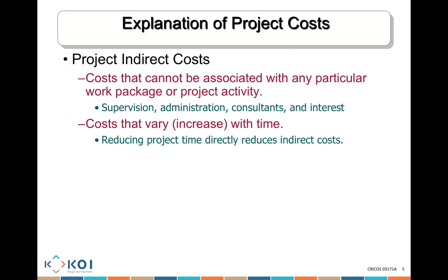If I think about, for example, the consultants. If my project is going to run for a shorter period of time, what's going to happen there? Well, if it's going to run for less time, we're going to be able to pay less money for the consultant throughout the duration of the project.